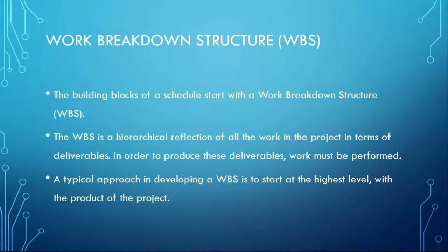That particular thing was performed because the project manager paid attention to a system that works in project management. Now, when you look at that 3-bedroom flat, how were they able to achieve it? First of all, it's what we call the initial phase, intermediate phase, and the final phase. Okay. Now, when we look at the initial phase, let's say, for example, we are taking the foundation as our initial phase, and then the raising of the block and the rest of them as intermediate phase, and of course, the finishing as the final phase.